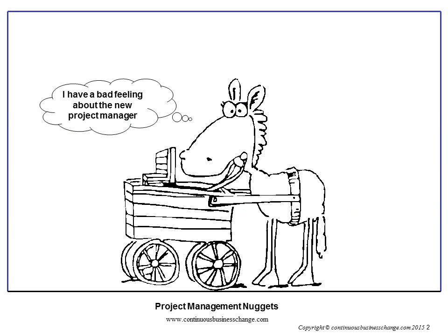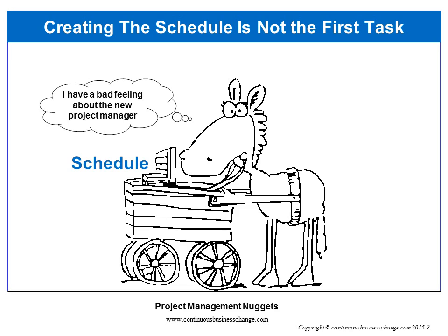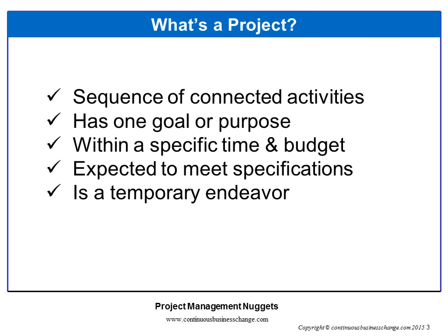Too often, teams fall into the trap of putting the cart before the horse. Creating and publishing the schedule is not the first task. Resist reacting to the pressure of publishing a schedule prior to understanding the project. Your initial schedule is the schedule for developing the project plan.